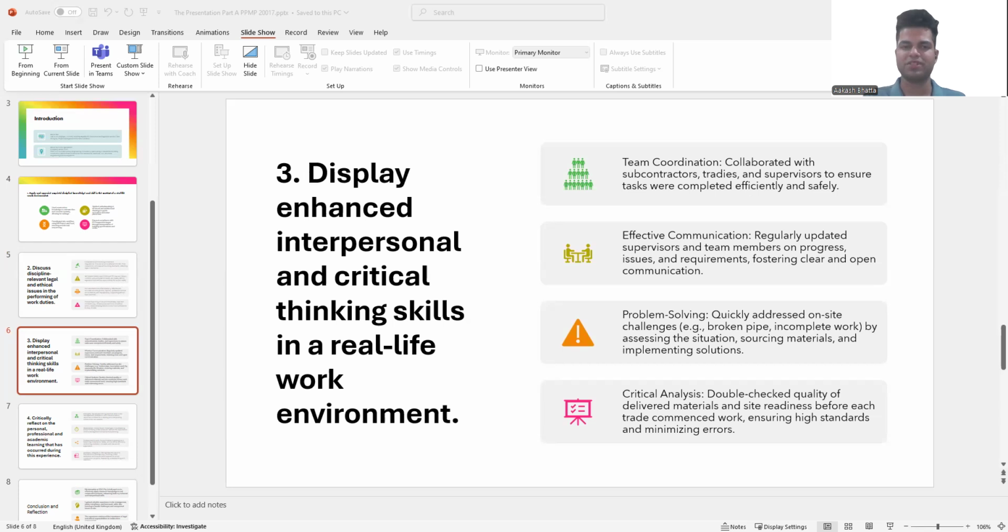So these are the common mistakes. And also when the painter wants to start his work and the gyprocker hasn't finished, we cannot let the painter come and waste their time. So for the smooth flow of work, we need to manage and let the painter know at the correct time when they can start the work.